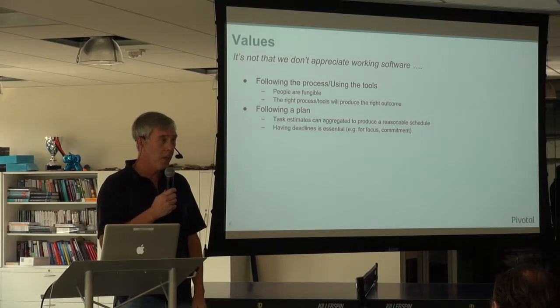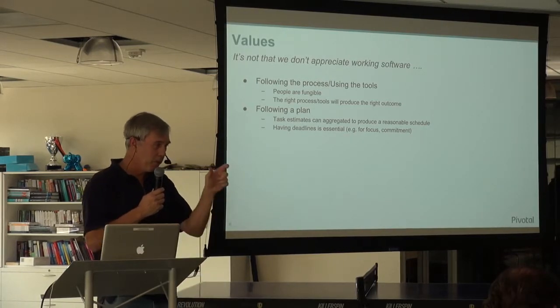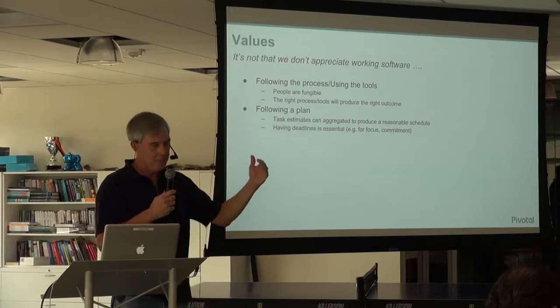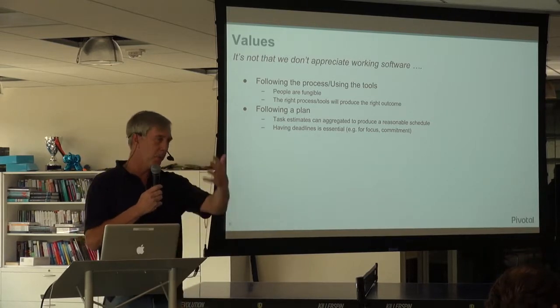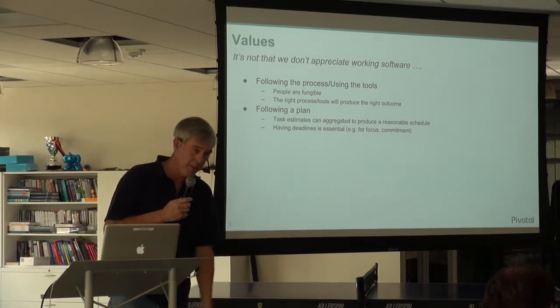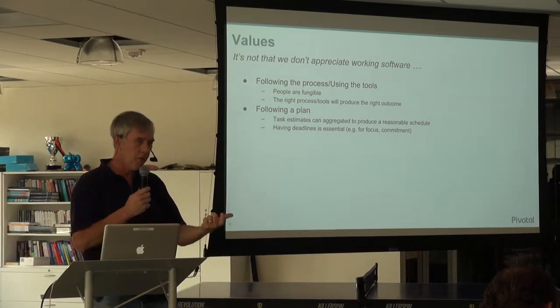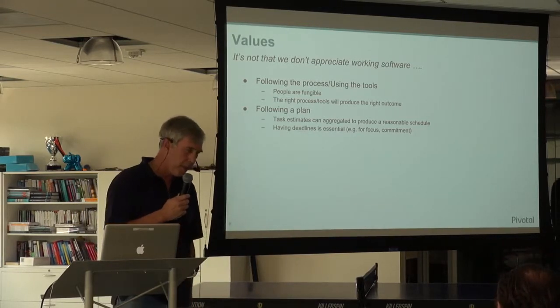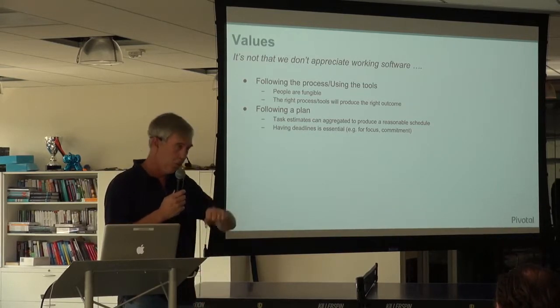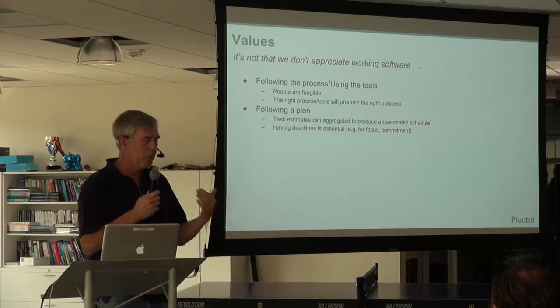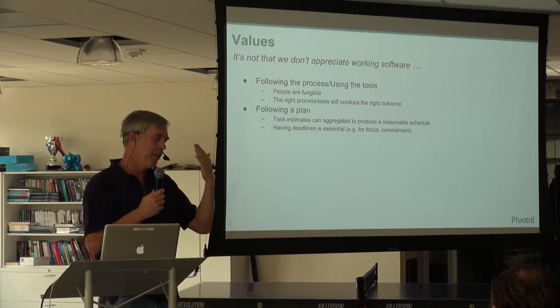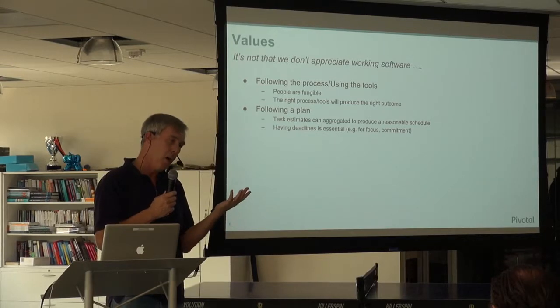So they had various schemes, which is, okay, so why don't you give me your X% confidence estimate? And then what's the variance on that, all right? And they plug in those values, and they run it through their computer, and they get this predicted output. Now, that is actually better, right? But you still have people hovering over the individual tasks saying, are you done yet? You said it would take 3 days, or 2 days, or whatever it was, which has created a lot of pressure, a lot of counter incentives in terms of quality.